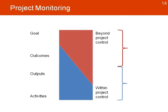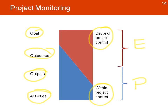We then look at the areas where the project can make those changes. Areas within project control are mostly the activities and certain outputs. The areas beyond project control are the goals and outcomes, mostly because by that stage the project activities are already completed. Evaluations — often conducted after the project is completed — will help inform new projects or future changes. But the key idea is that the activities within the project's control at the beginning will influence the outcomes and goals of the project.